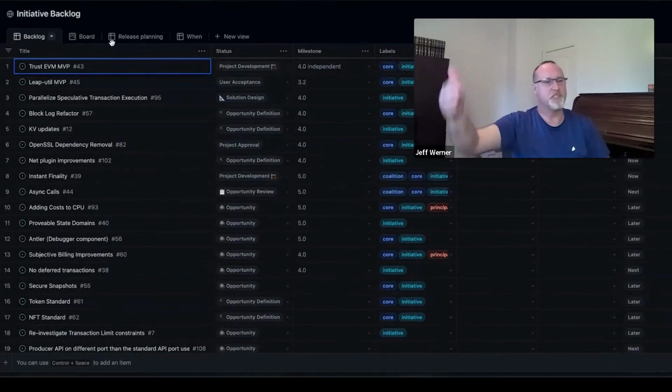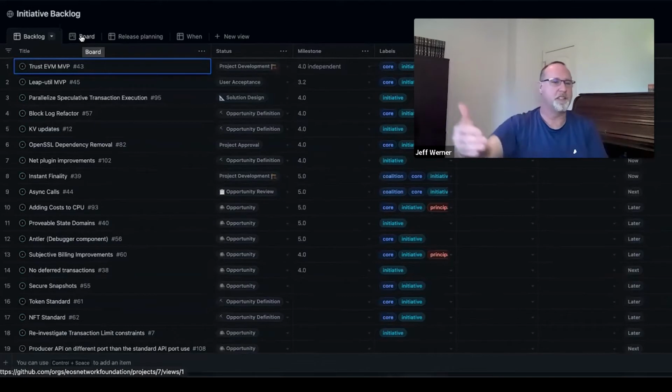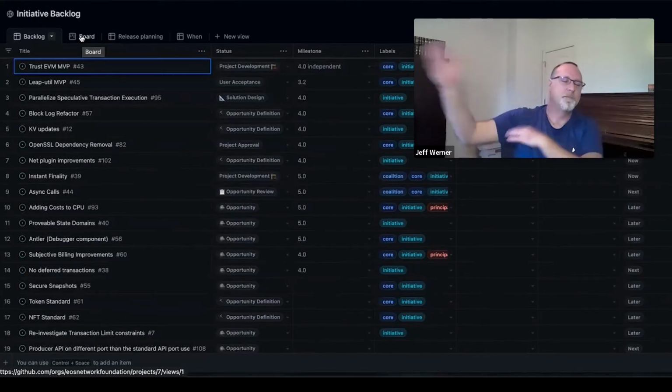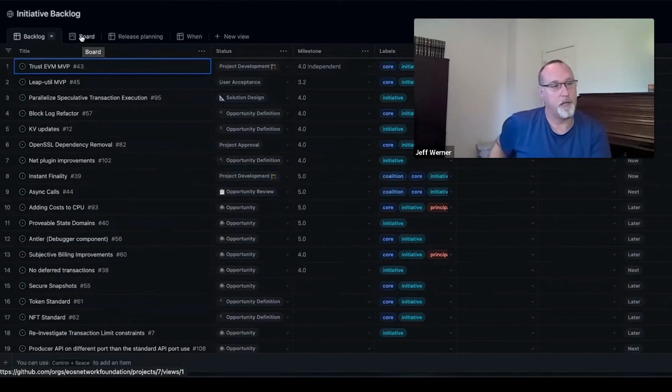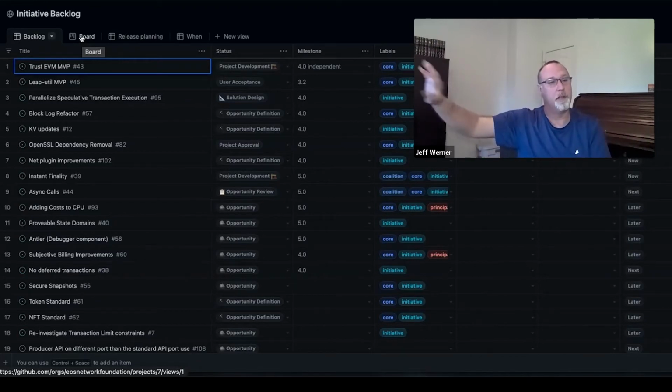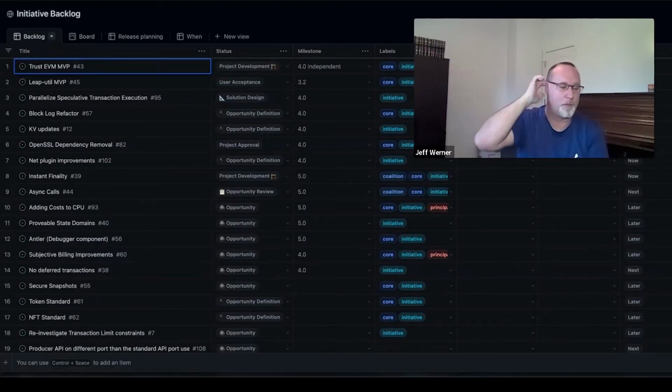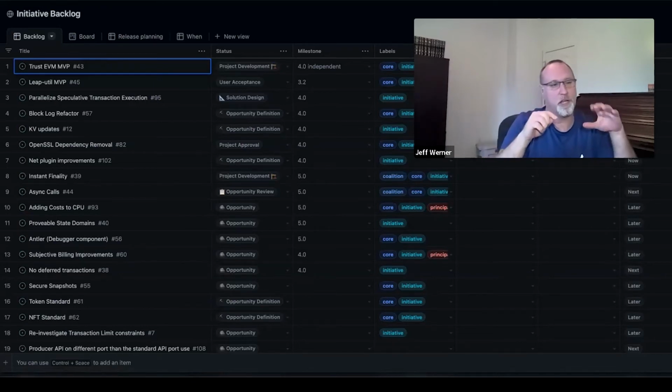But then when we get to the resourcing step, like you saw the number of phases, there is one later. This is after Eve and Ted and the executives approve something, meaning it's got enough detail, we're willing to spend money on it, more significant money. That's when we start the question of, okay, who can do this? In some cases, it's going to be an external party, and it's not even ENF, right? In which case, we no longer care. We treat it like a third party, you get what I'm saying there. But if it is internal, that's when we have to start adjusting.